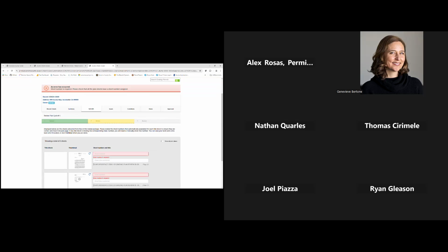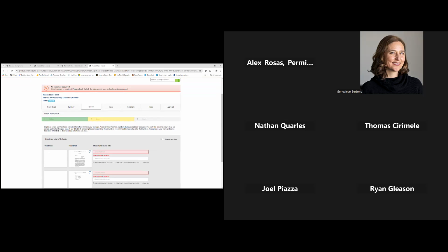And this is important because when we go through the review process, if you had a set of plans that was 20 pages long, let's say, and I'm not sure sewer permits get to that length, but if there were multiple pages here and during the review process something was identified that required a correction, and that correction was on sheet 2, the system is going to ask for you to upload a set of corrected documents, but it's going to bring in that sheet as a corrected sheet as opposed to correcting the entire set of documents. And so it maintains version control on individual sheets. So that's why it needs to break it down into sheet numbers.